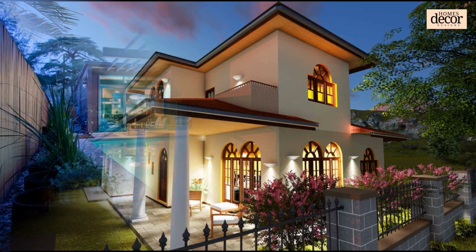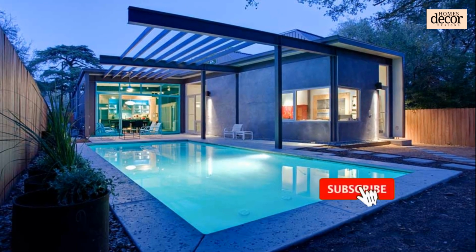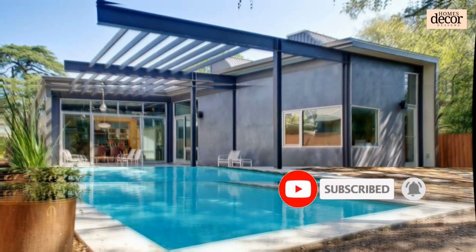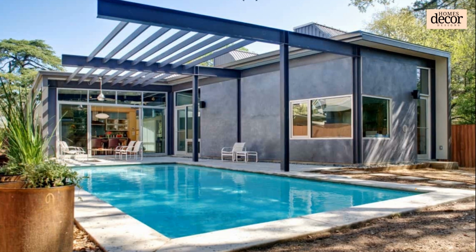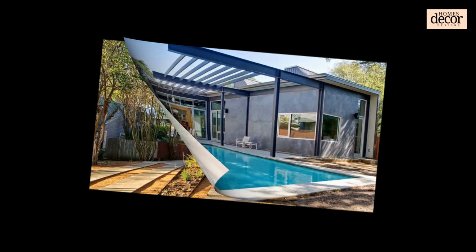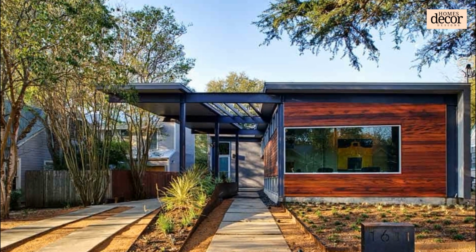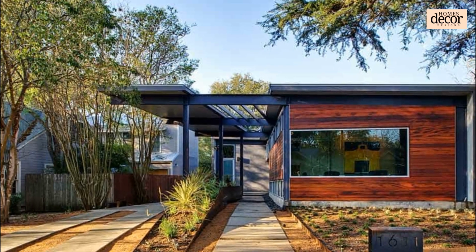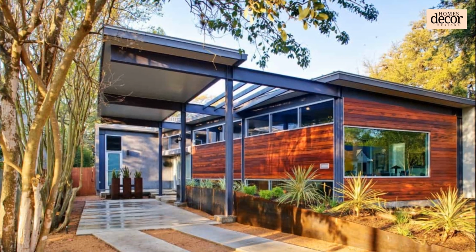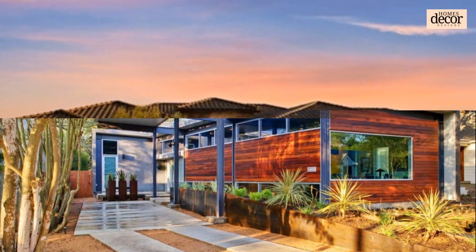The first consideration is going to be zoning laws for your area. Will the city permit you to build an addition? Many properties have setbacks, or space that has to be left before the property reaches the road or walkways. This could hinder building from the start. Building permits also need to be obtained. Don't try to build without a permit, as permits ensure additions are built up to safety codes to protect homeowners in case of natural disasters and for general safety reasons.